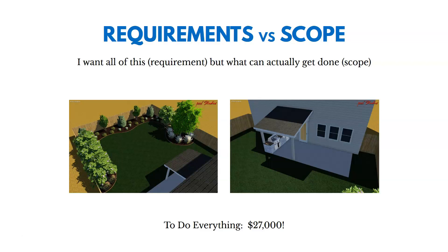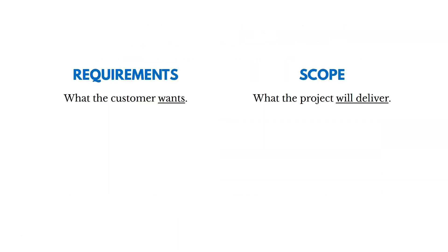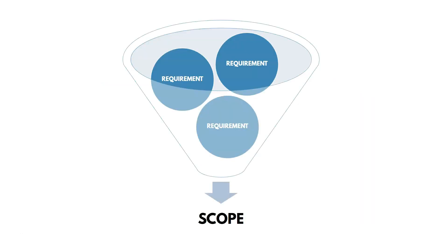Requirements are really what the customer wants, and scope is what the project will actually deliver. Scope may not include all requirements because of constraints we have of cost and schedule. Think about all the requirements coming in and the scope coming out — we're developing a detailed description and decomposing it to make it easier to manage.